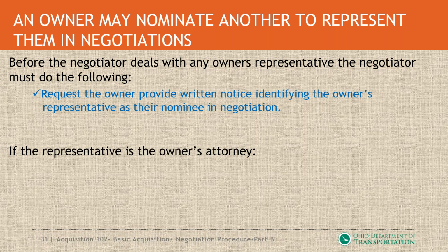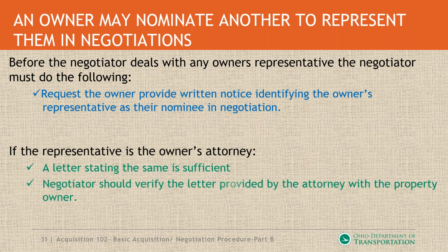If the representative is an attorney, then a letter stating the same would be sufficient. The negotiator should verify the letter from the attorney with the property owner. The reason I say that is that on a large project, letters will go out to property owners, and sometimes we may get a copy. You want to be sure that the property owner is being properly represented by the attorney and to verify that information.